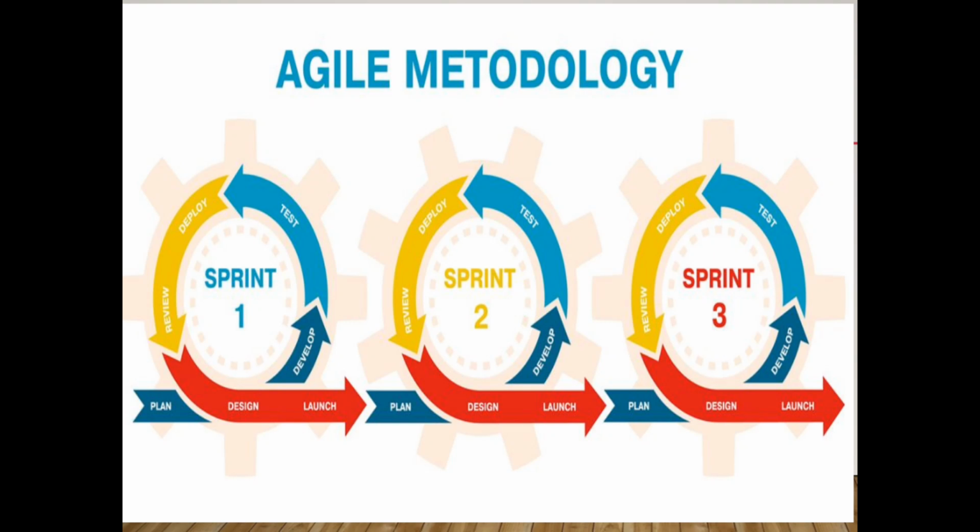Those splits may also be known as phases. For example, you're constructing a house. A foundation can be a split or a phase. So you're going to plan for a foundation, you execute a foundation, you monitor and control, then you finish. If you're going to build the wall, you are going to the next split. You plan, you execute, you monitor and control, you finish. Then you can do the same with roofing.